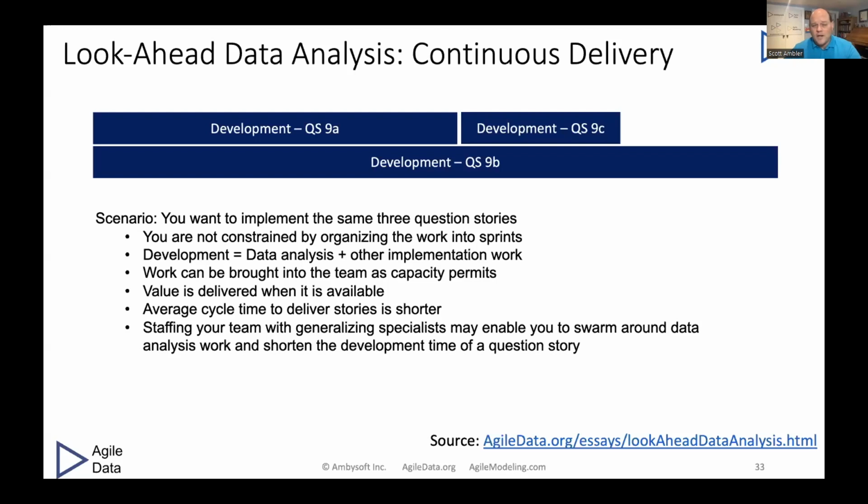And this is one of the main contention points between those two methodologies. But this is the reality on the ground for data warehousing teams. So this is, once again, one of the reasons why I suggest using a Scrum-based approach to get going for release 1, but then shifting over to a Kanban-based approach for release 2+, just due to the greater flexibility and less overhead.